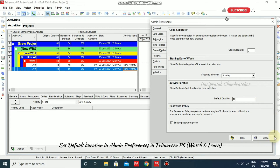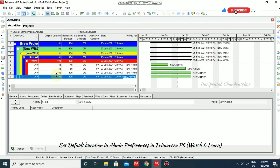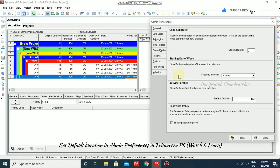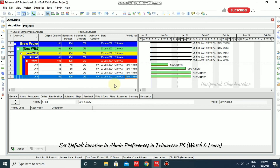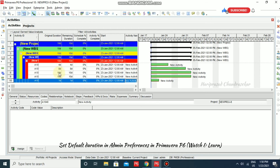Setting the default duration to 12, the activity is coming as 10 days because of holidays. So when you put 10, you get 8 days, and when you put 12, you get 10 days — this difference is due to holidays in the calendar. So you can choose default days from 1 to 5 or whatever you need.